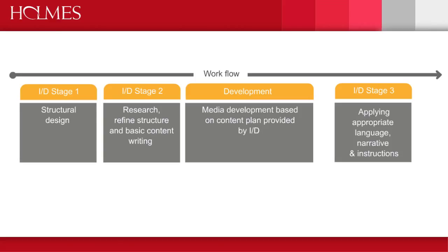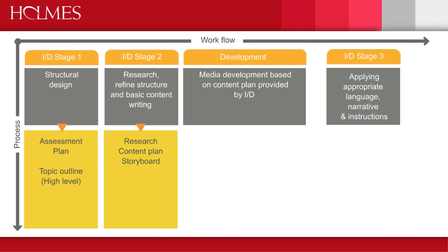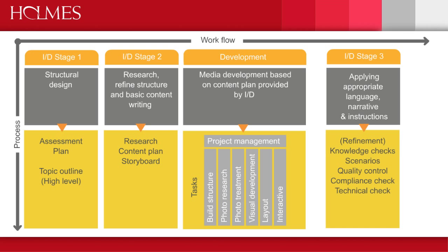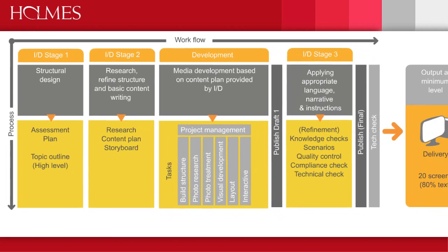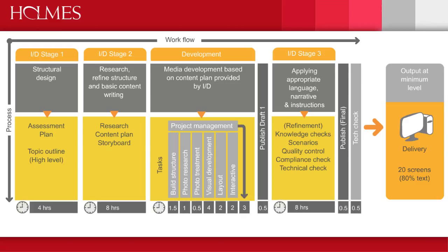For each of the stages, we developed processes. This includes assessment plans, content plans, storyboards, media production, and then final instructional design tasks. This ultimately leads to publishing and course delivery. After building the workflow and establishing basic processes, we then had enough information to time out how long it takes to complete tasks in the development process.